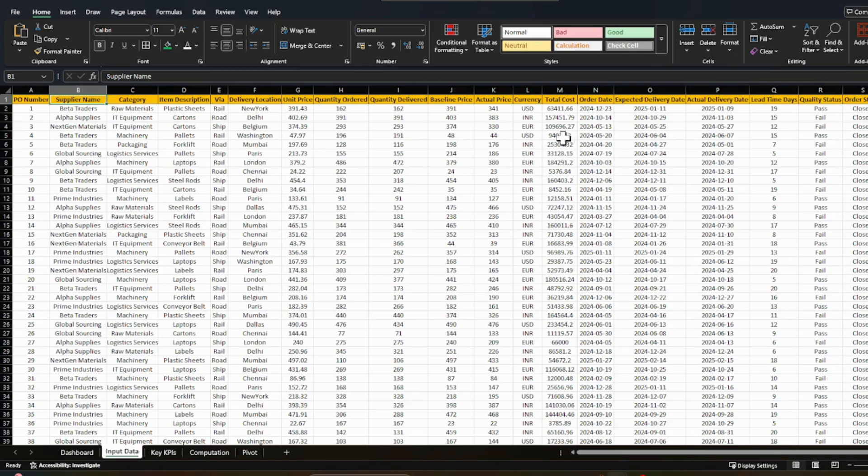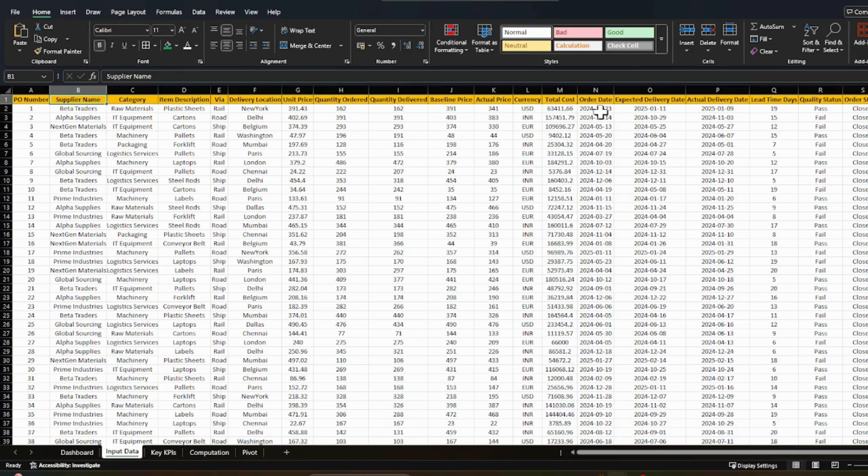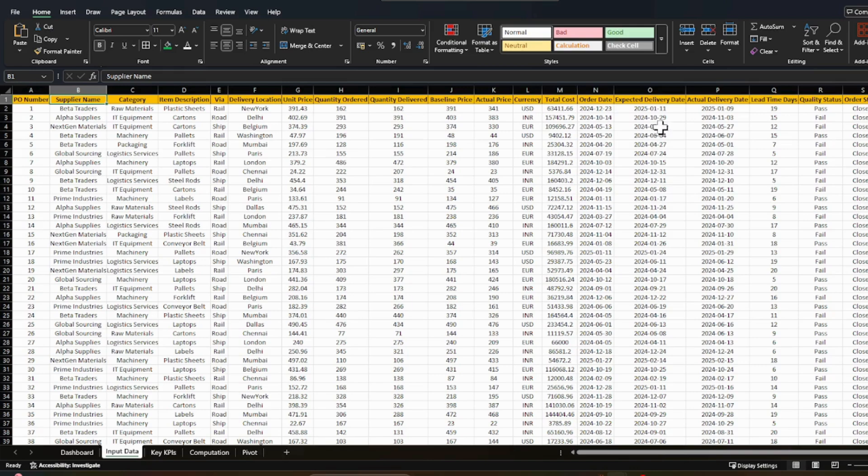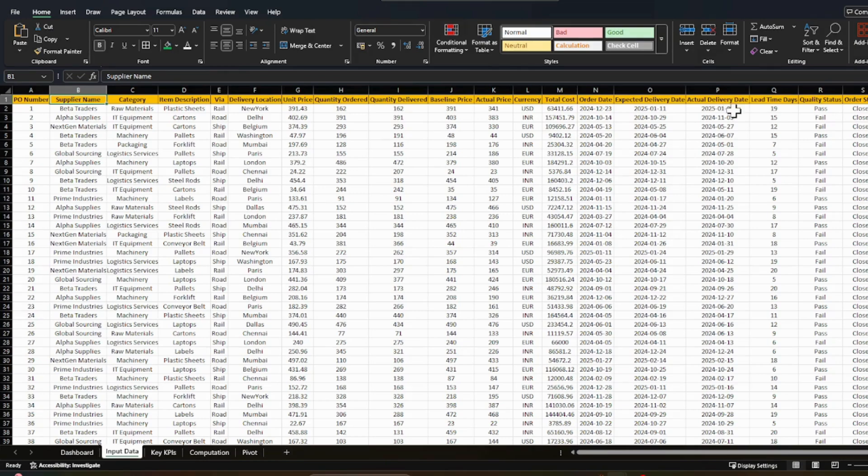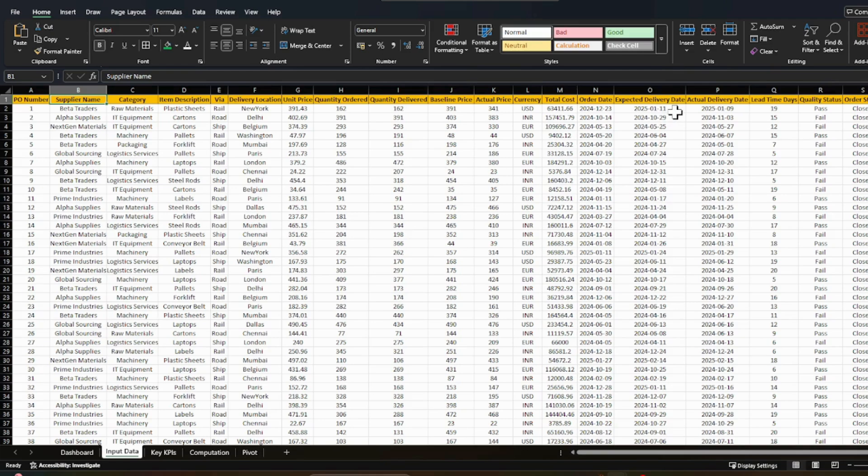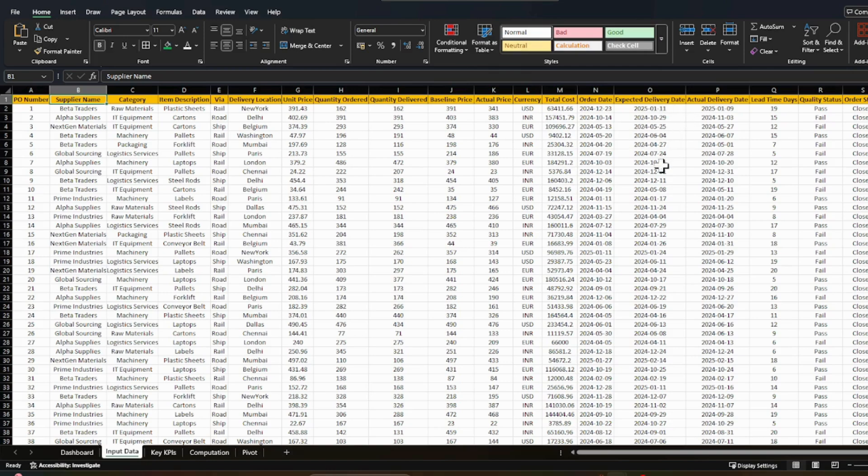Then there's a currency. Then what is the total cost? Generally, this is your baseline price multiplied by your order quantity. And then what was the order date and what was the expected delivery date? So there is something called lead time. So this is generally the difference between the order date and the expected delivery date, but due to real world constraints, the actual delivery date can be early or it can be way after the expected delivery date. Expected delivery date is very much important in order to ensure your production planning, and each of your planning systems work on this date.